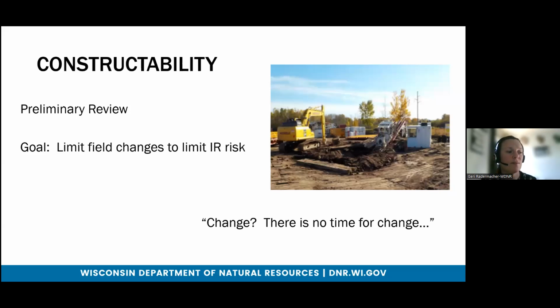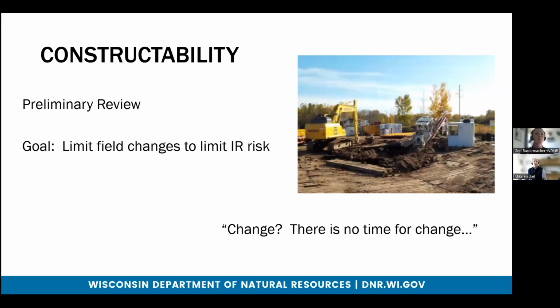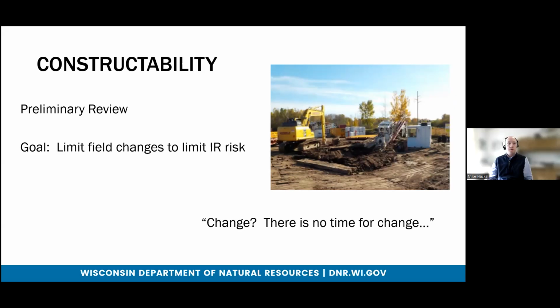So I'm going to talk about the constructability aspect of looking at these projects and utilizing the tech standard. Constructability and risk review is a preliminary review to investigate and plan for site conditions and restrictions that may increase the likelihood of an IR or impact your ability to respond to an IR should one occur on a project.